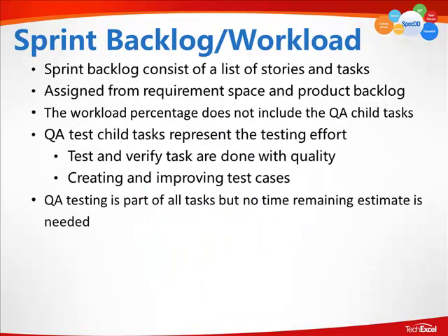So, moving on, next topic is our sprint backlog, which is essentially our workload for the specific sprint. Now this is a little different than a product backlog. Okay, in our diagrams we distinguish the two. Product backlogs feed the sprint backlog, and the sprint backlog changes with every sprint. It is by definition the workload that the developers need to finish for that particular sprint.